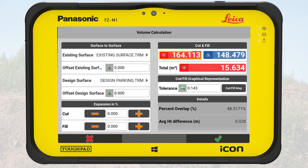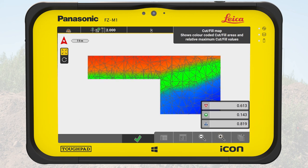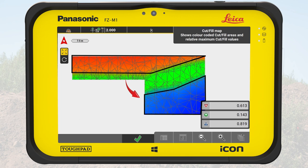The calculated volume is shown on the right side. The surface has around 164 cubic meters to cut and 148 cubic meters to fill. Below, we tap on the cut fill map. The view visualizes the height difference between the selected surfaces. It helps to detect the areas where material needs to be removed from and to where it can be placed instead.